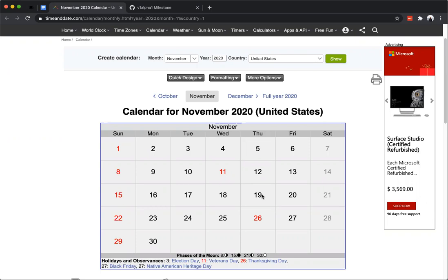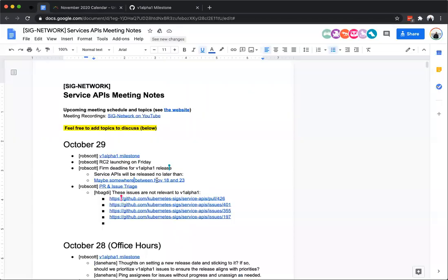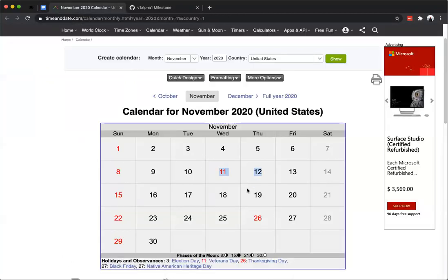I made a slight change to what I was initially. I had called this a release date that we would commit to, and I've changed that to a release deadline, in the sense that we will release no later than this date. But I really, really would like to hit sometime in this week. I think that's actually realistic. But I do want to have something fairly conservative, that we can say we're going to release no matter what when we hit this date. And if it's not in, it's not in. We're cutting a release.